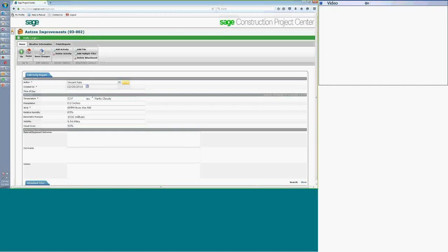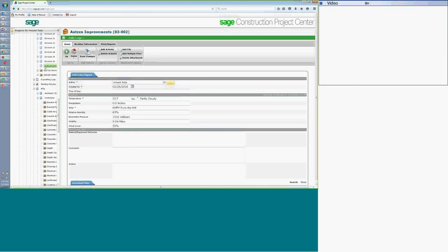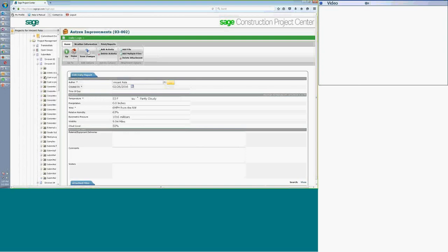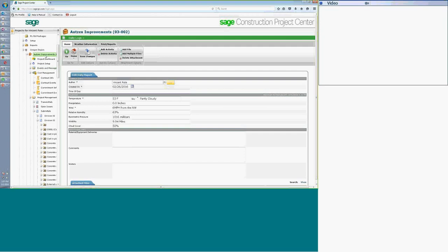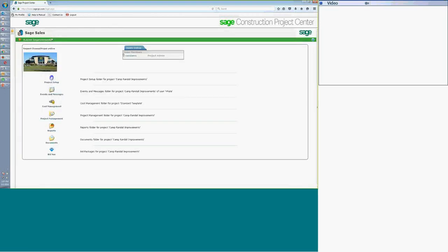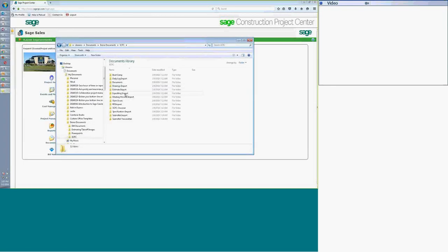All these documentations are set up in the system so that you can also quickly get everything out at the end of the day. You can simply come up to the project, say it's at the closeout time, and click Request Closeout. Requesting Closeout will give you a download that you put on a flash drive or another Blu-ray or DVD if the smaller files are in there.